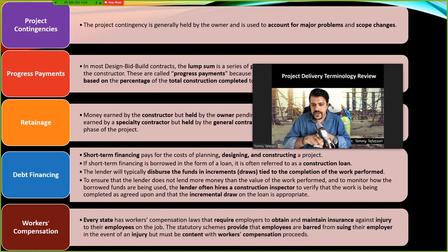Workers' compensation, yeah. So every state has workers' compensation requirements. Based on workers' compensation, employers are required to obtain and maintain insurance against injury to their employees. Okay, and the construction industry being one of the most hazardous industries, it's very important to have workers' compensation here.